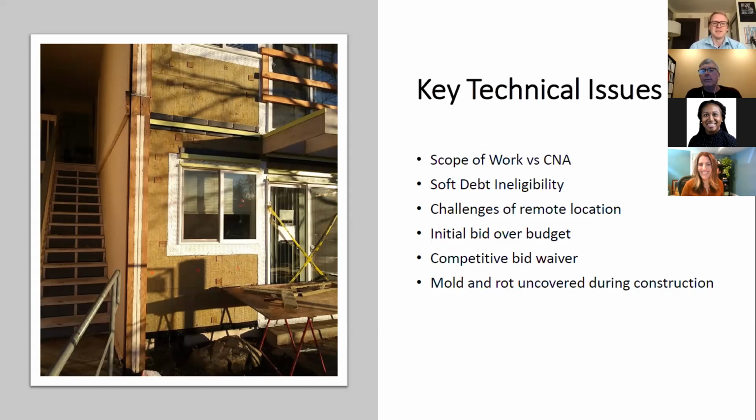It wasn't necessarily a huge burden, but it did add another month or two and another thing for their national office to approve as we approach construction. We were able to get that approved and hold the pre-construction conference and issue a notice to proceed in August of 2020. Obviously, the challenges of 2020 led to some of the delays in getting things moving.